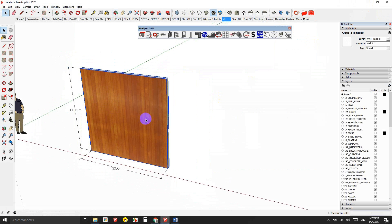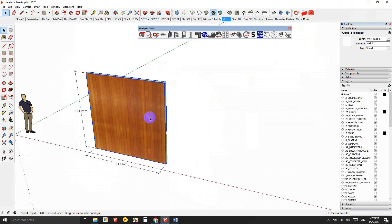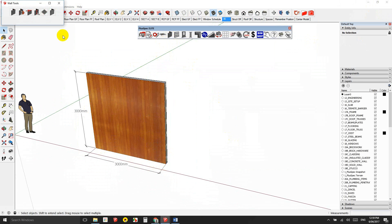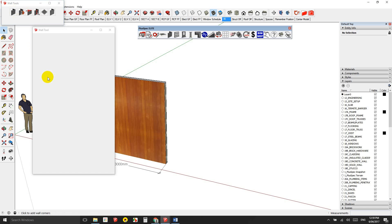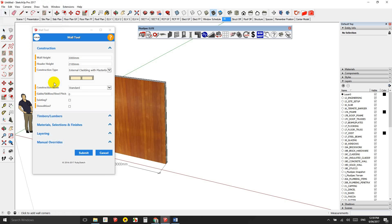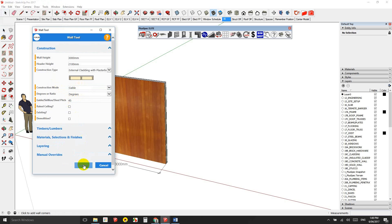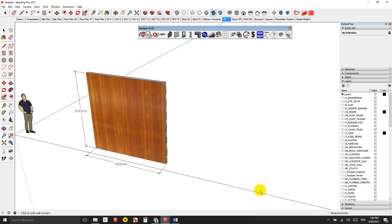Now, where I find the traditional software that estimates by line and by square meter by length times height is that when you come to a wall that is actually a gable wall or a raking wall, it doesn't allow for the extra lengths. Well, not that I'm aware of, not when I was using it. So I'm going to say, let's make the next wall a gable wall, we'll make it three meters high to the, and we'll then add a 45 degree pitch on top of it. 45 degree pitch and go submit and draw this wall three meters long as well.